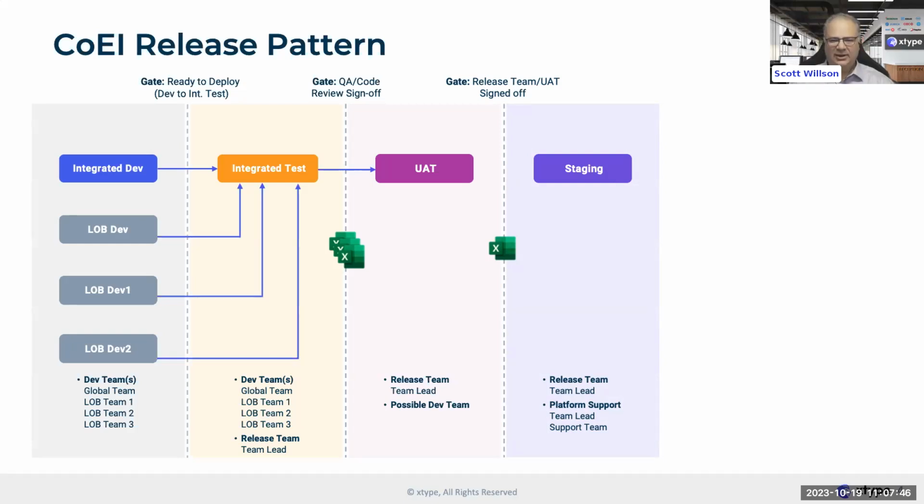Exactly. Correct. And then of course we move on to staging. This may be called various things, but I like to refer to it as a clean room. You've probably recently cloned this from production, right? As we're showing here in the diagram, you've consolidated the run books to the precise ordered list of things that are going to go into this. Is that right? Yeah, you're looking at a pre-production instance that is almost exactly production. And this is when you're combining all of those run books into that single release and ensuring that process works properly, and we're not running into any issues moving update sets and code and all of that.